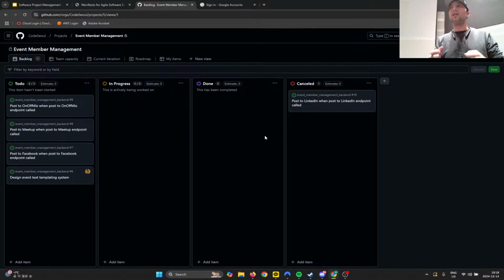So earlier I mentioned that you should maintain your story points, right? So if you have a hotfix, or basically if you have emergent work, I'm not 100% sure if it's textbook Scrum or not, but this is how I learned it. If you have work that's added to the sprint after the sprint was planned because it's some kind of emergency work, like a hotfix, we would usually call that emergent work because it emerged after the sprint was already planned. If you add emergent work, and let's say the emergent work is 4 points, you should remove something from the sprint that is also 4 points. So you maintain your commitment of work time. And then when you do that, you need to inform your customer that you removed something from the sprint in order to do this other work that is considered more important.